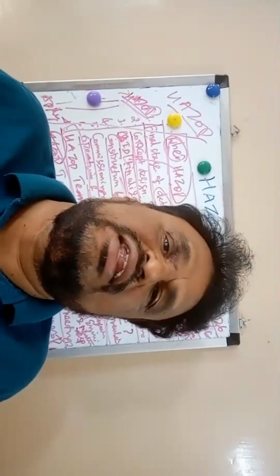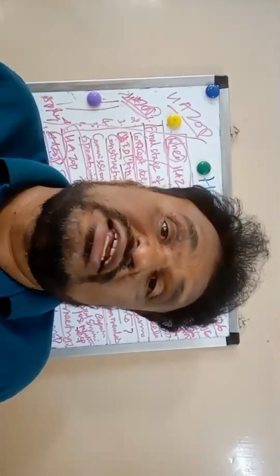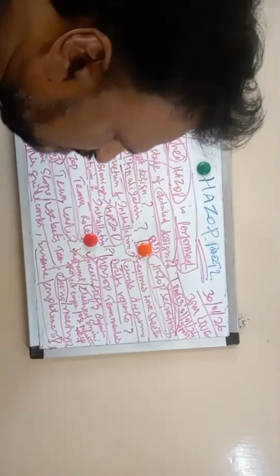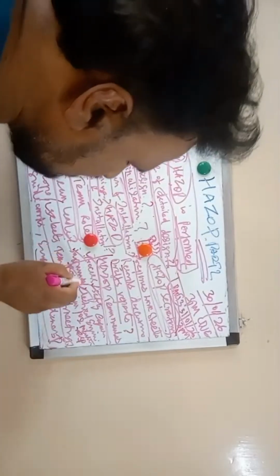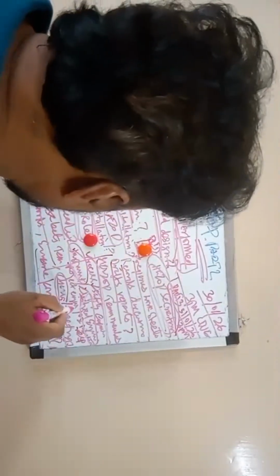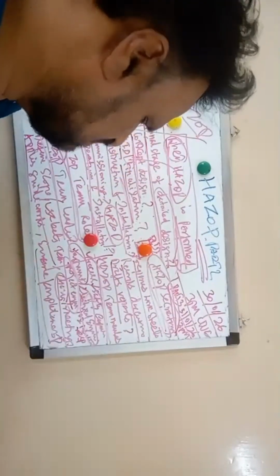the operations abnormalities. Any issues in the operations also need to be found out through the HAZOP. So that's why make sure team members are from all departments, not only safety. There is a process engineer, a safety engineer, an instrumentation engineer, and an electrical engineer, because instrumentation is for the automation, then the electrical engineer for electrical systems, and the project engineer is for all the systems.